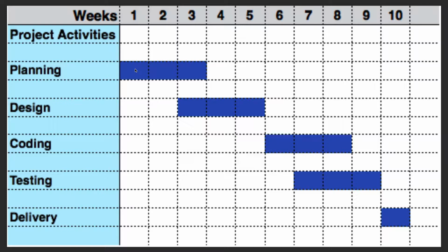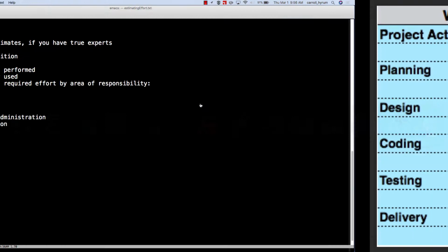And an expert would say, okay, I've looked over the specifications, the requirements, the environment, all of that very carefully. And from my experience, that's probably what makes him an expert, managing 20 of these projects already in similar environments, planning is going to require 100 staff months or whatever the case is. Of course, this could be broken out in more detail. And design is going to require this much at this phase. That allows us to break it down, and then we total up all of the estimates. Okay? So this tends to work very well, with the caveat that you have an expert.